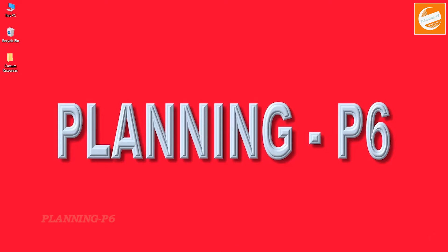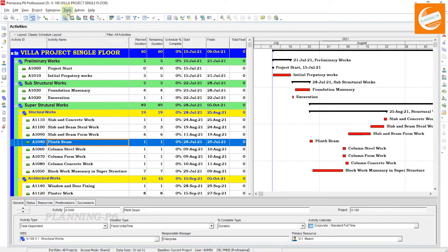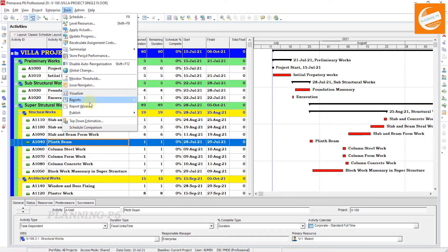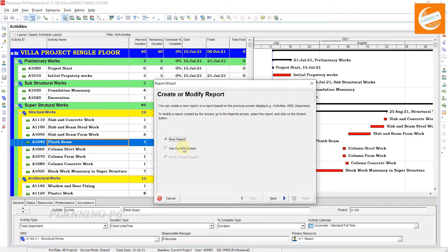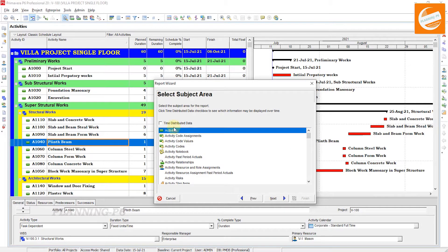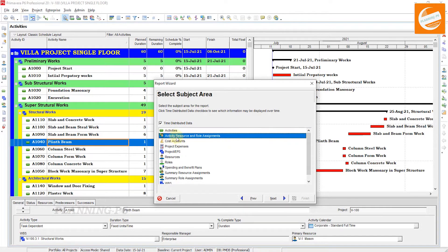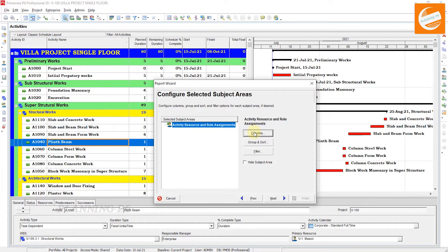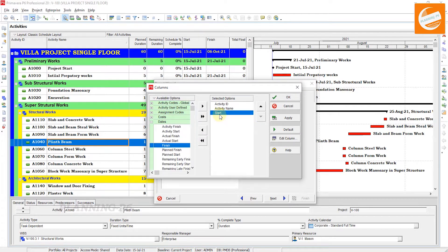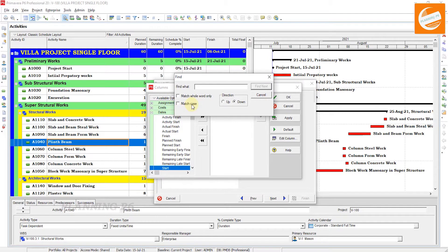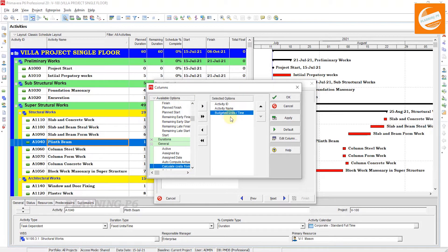I have already opened my Primavera P6. Go to Tools, this is the first method. Go to Report Wizard. In the Report Wizard, use the front screen, and click Next. Check on the Time Distributed Data, then click on Activity Resource and Role Assignments, then Next. Here in the Columns, we need the Budgeted Units and Budget Time.